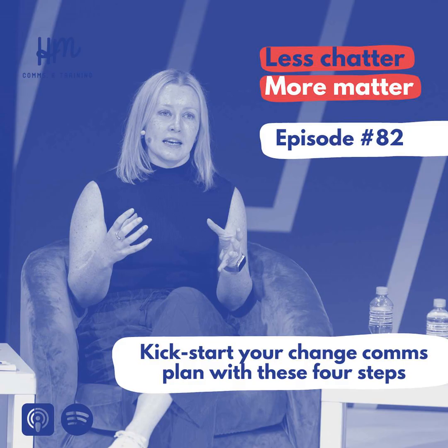Now, for those of you who have read my book, this will sound familiar. You'll see a little matrix in there I've drawn up to help with this. But basically, imagine this. On the horizontal axis, you have impact from low to high. And on the vertical axis, you have control from low to high. So impact is basically how much this change will affect a particular audience group. Is it a big impact or just a little impact or somewhere in between? Control is exactly what it sounds like. How much control do people have over the change?